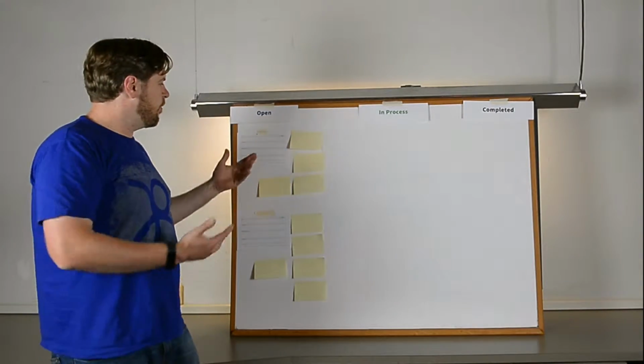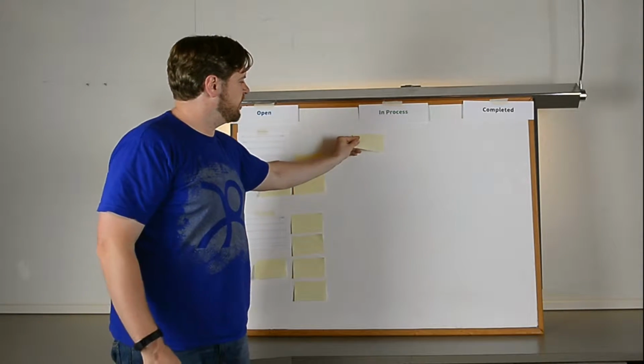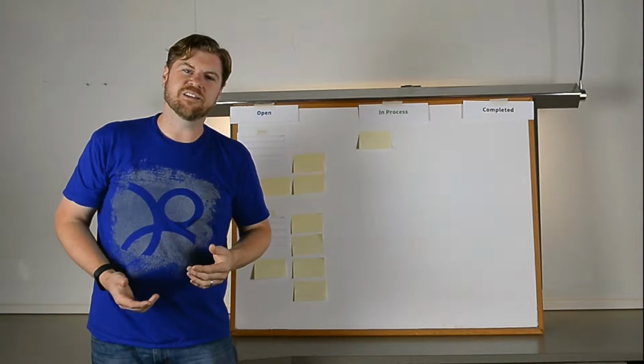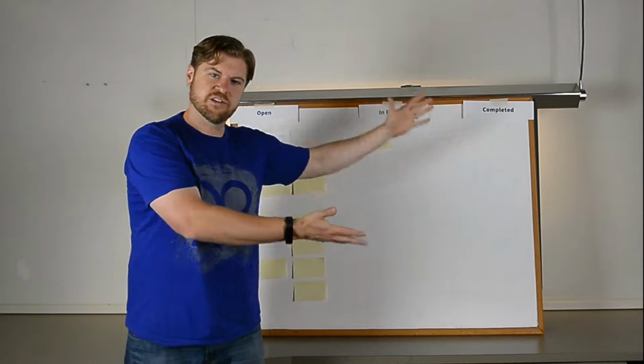And so every day we'll walk up to the board when the whole team comes together, and we're going to grab cards and move them, assign them to ourselves essentially, and say, hey, this is what I'm working on today. And as those cards continue to move, we're working through our sprints.